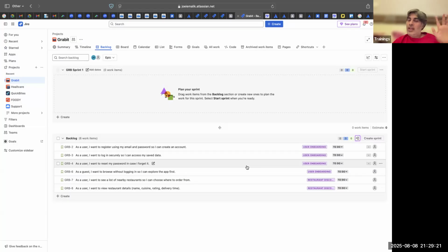So grooming call has already happened. And let us say you had no grooming call. Straight away you are into planning. Your developers have no clue what story is what. Can they decide which story they can pick up? No, it's all guesswork with no logic or reason. So that is why you need grooming calls. You need to have a discussion before you get into sprint planning.